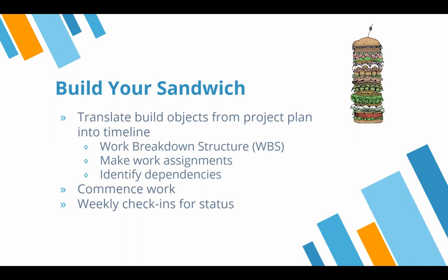You want to just say, here I'm creating this thing. I'm responsible for this thing. And that may have several items that are associated with it, but ultimately it all has to be done to deliver a larger subset. And so the work breakdown structure helps you define that and helps you identify all the things that have to be created and done. The next piece is you're going to do the work assignments.